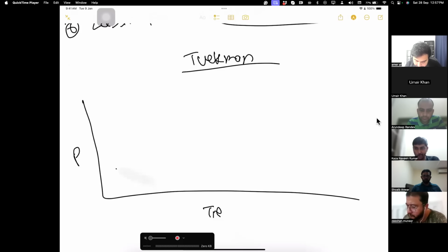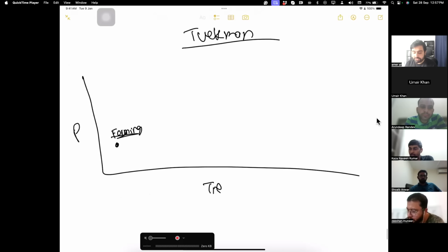So when the team comes at the start, it is considered a forming stage. The team is just new. Okay. So you make a team charter for them. You understand their requirement. You are giving them direction. Do this, do that. So you are more directive in nature.